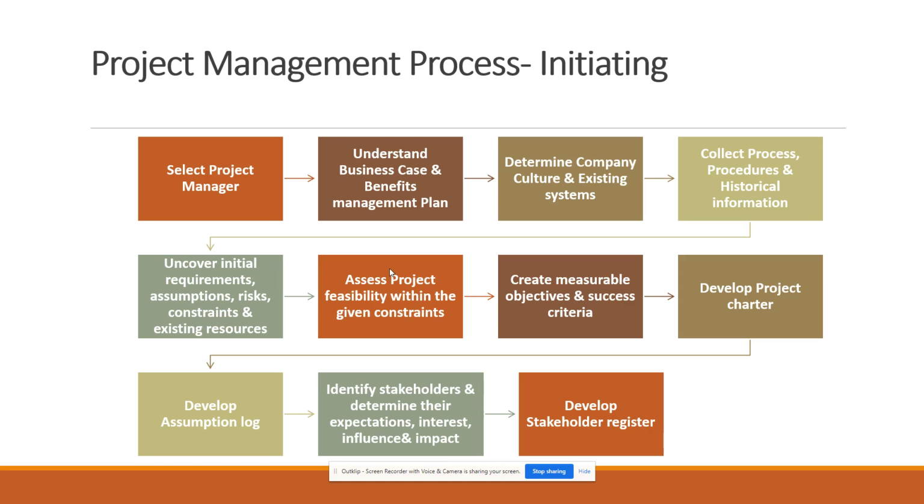Then the project charter is developed that will contain all of that. The project sponsor will develop it and authorize the project manager to execute the project. Once that is done, at the same time, the assumption log should be developed. The assumption log is developed by the project manager only. It's not done by the project sponsor. The project manager develops the assumption log. Then we have to identify stakeholders, their expectation, interest, influence, and impact.